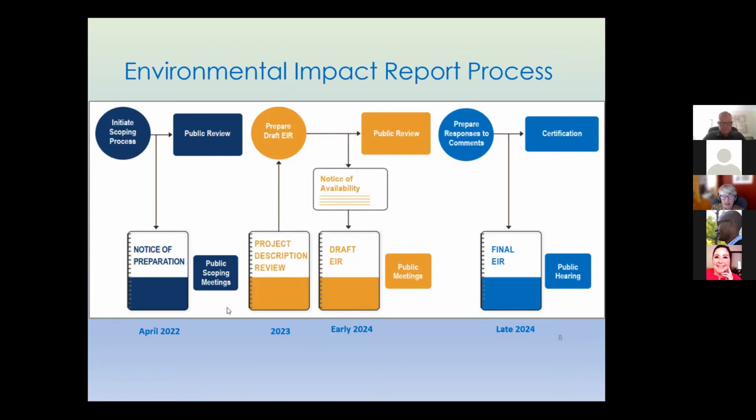That will start the last phase, preparing written responses to comments received on the draft EIR, making revisions, and finalizing the EIR. At that point, the JPA can then certify the EIR and consider project approval. Next slide.